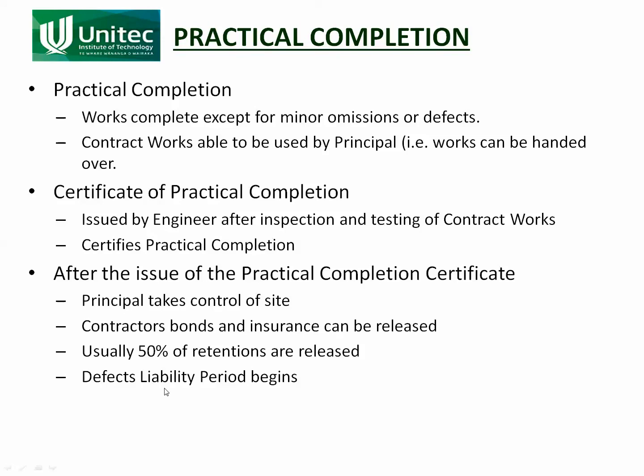The other 50% of retentions is held until the end of the defects liability period. The defects liability period begins at practical completion — there is usually a period of 3 months, 6 months, or 12 months where the contractor is required to fix any workmanship or material mistakes.